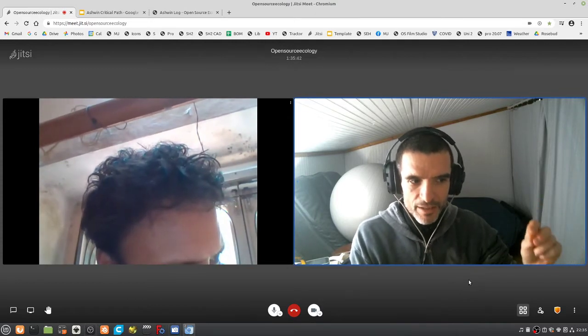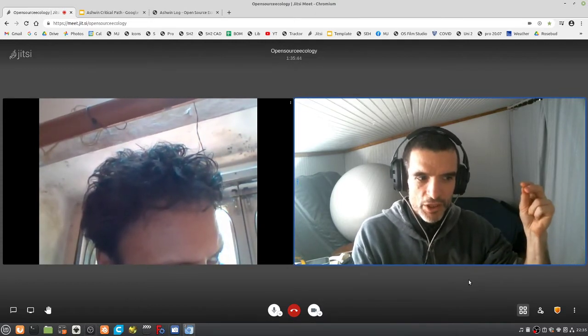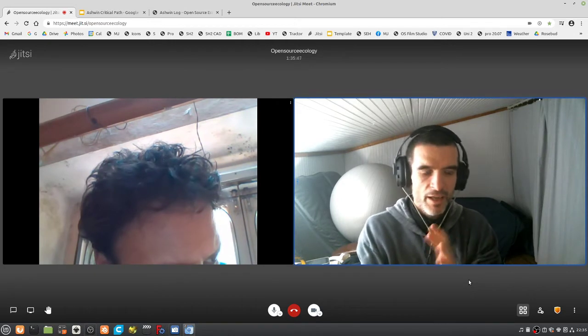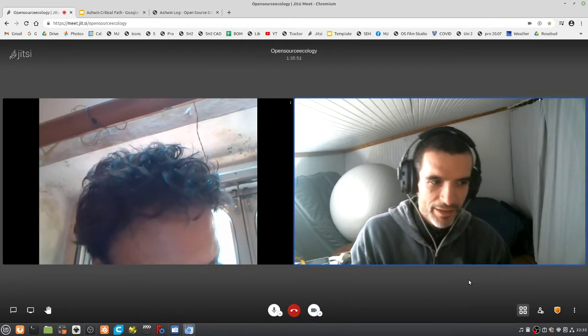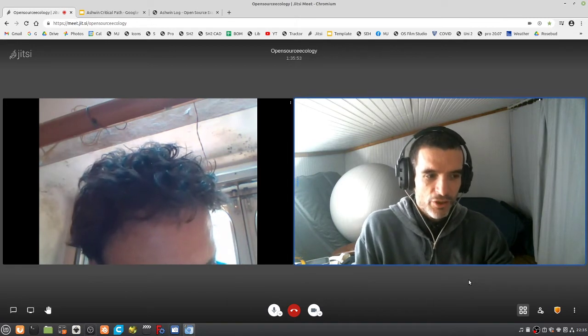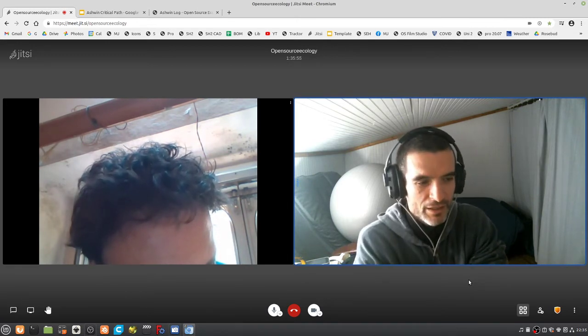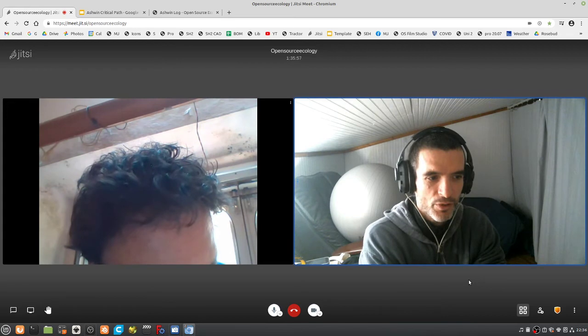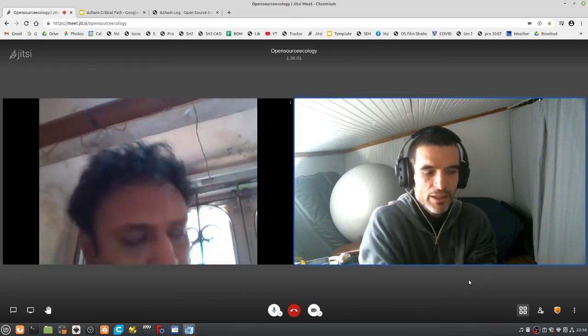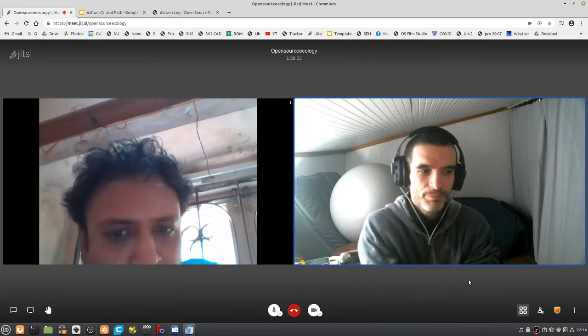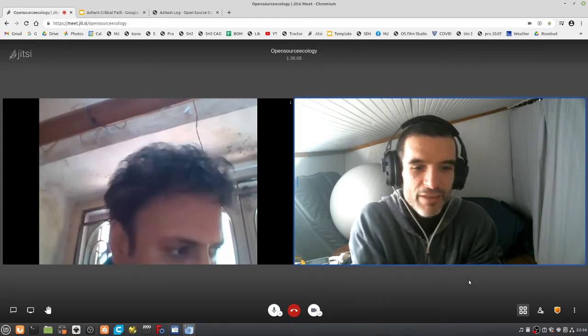Others can actually edit it and draw interesting information out of it. Like, for example, the other day, I reviewed my videos on painting, staining the wall panels for the house. So I'm actually getting real data. I figured that it takes me 9 minutes per panel to spray paint each panel. You get real data out of it just by analyzing the video. And it's the stuff you wouldn't have time to do.